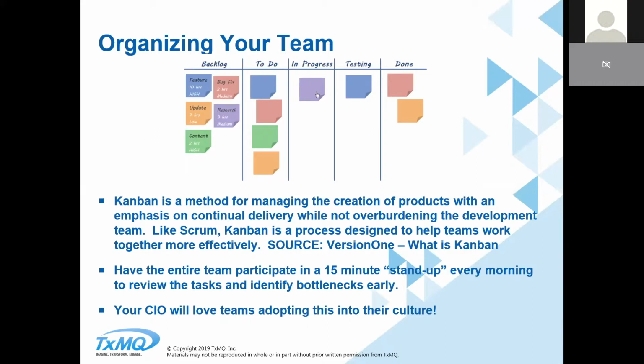And Kanban seems to work well, in my opinion, by having cards up on a board to identify: here are incidents that I am working on, here are migration activities that I'm working on for the day, here's things that are in testing, things that are in backlog.